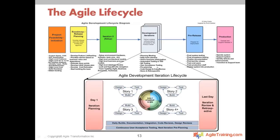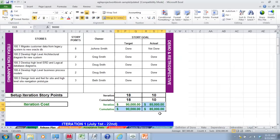For projects, scrum has worked very well because it forces a planning meeting at the first day of the sprint, a daily stand-up every single day, and at the end — my favorite — a sprint review: show me what you really got done. Then the retrospective. Within the sprint there's daily build, documentation, integration, code reviews, design reviews, continuous testing, and most importantly pre-planning for the next iteration.